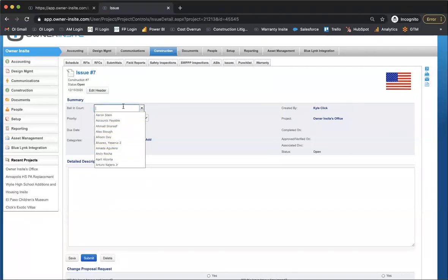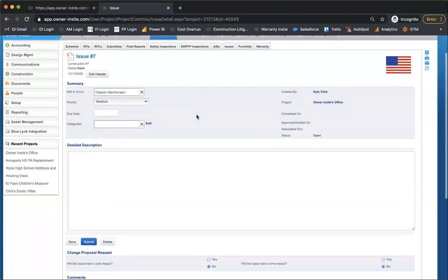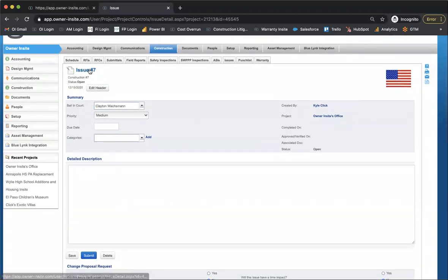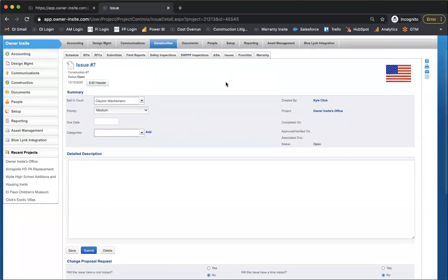Yeah, well, we like to also assign it to the architect. That way the architect can determine whose scope it falls under, if it in fact is something that should fall under the scope of the GC. But what I was trying to say is we would like to encourage all parties to initiate issues. Anything that anyone sees that they're unsure of, we encourage them to submit an issue with photos.